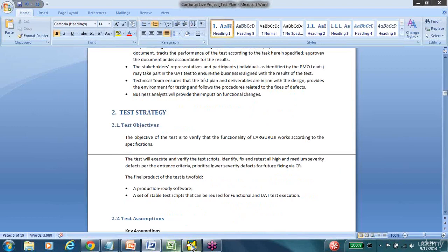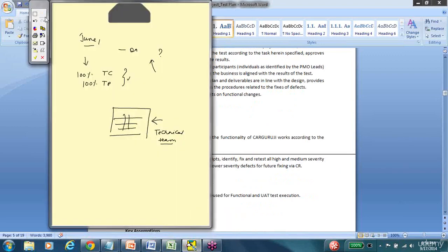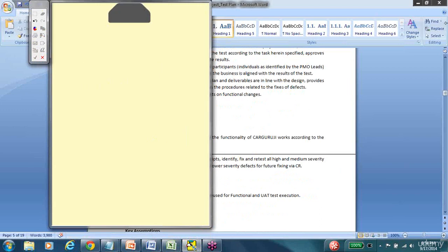So yeah, that's it. And yesterday we talked about a 3-point rule on how to determine whether a document is a deliverable or not. So one, is it an FYI to anybody? Two, do we need anybody's inputs on this? Or three, does anybody need to review or approve this document? So can we apply this 3-point rule to the test plan document and determine, what do you think, is the test plan a deliverable, yes or no?